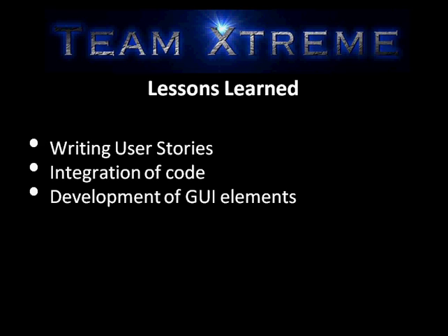Lessons learned number 2, integration of code. A process assigned one person at the end of each iteration to merge all the code from all the completed stories from all of the developers to perform a baseline that would be used in the next iteration. This ended up being extremely difficult since multiple developers were modifying the same elements as described in lessons learned number 3. We even found some changes were inadvertently missed during the integration periods. A proposed resolution would be for each developer to integrate their own code into the baseline version, which in turn would create a new baseline version for the next developer.